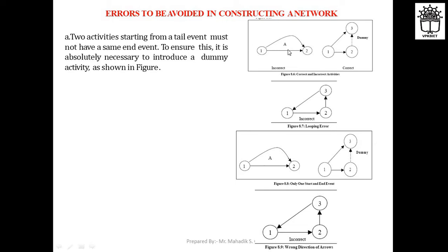If they come to the same event, this will not be the correct network diagram. So you can provide one dummy activity, like this.